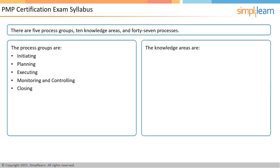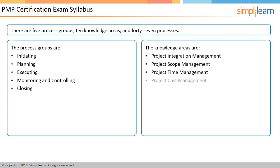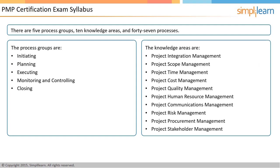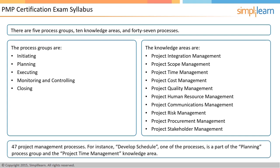A knowledge area is a set of specific processes performed to meet a project objective. As per the PMBOK guide, there are 10 knowledge areas. There are 47 processes in total. For example, develop schedule is one of the processes and is part of the planning process group and the project time management knowledge area. Likewise, in the human resource management knowledge area, the develop human resource plan process is in the project planning group, and the manage project team process is in the project execution group.